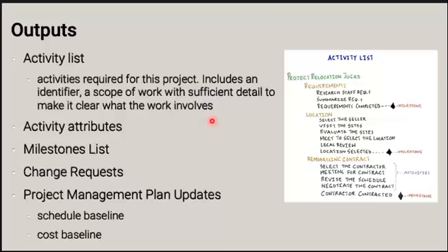But some milestones are mandatory, and those mandatory milestones are provided by senior management, customers, or regulatory bodies, listed in the terms of the contract, and the key stakeholders of the project. At these mandatory milestones, the key stakeholders are definitely going to want to have a look at your project, because it's the place to check it.